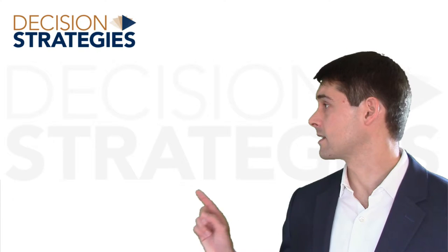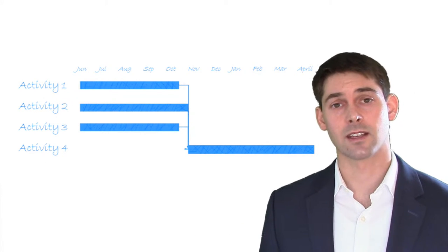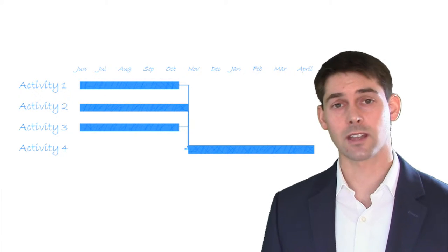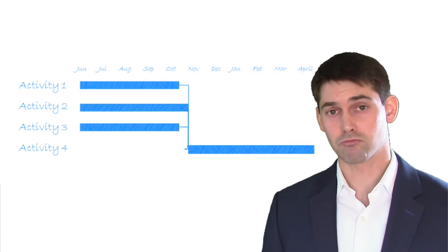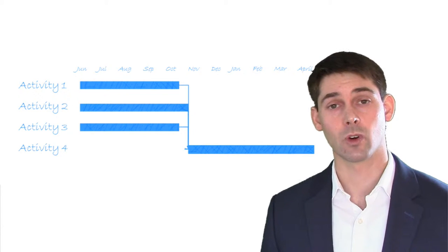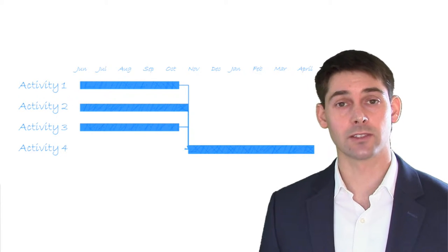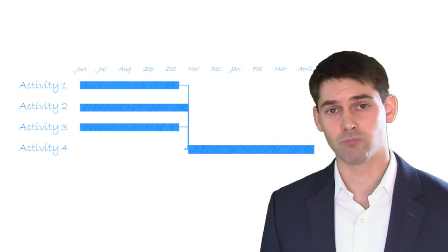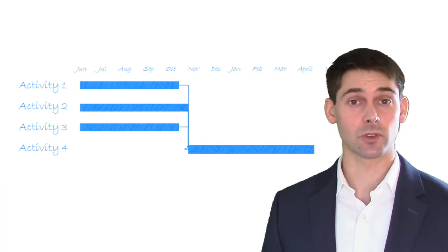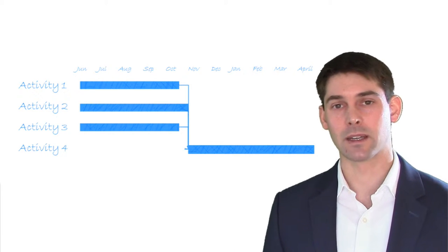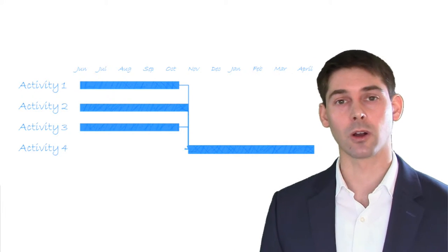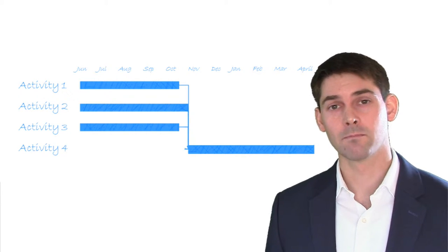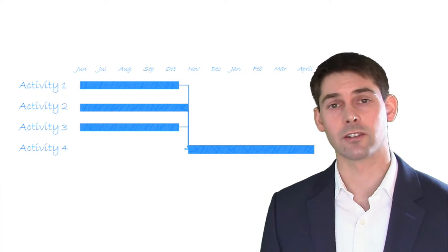Let's take this basic Gantt chart view, where each task is estimated at a set duration and set cost. The expert who put the schedule together has the experience to know that things could potentially take longer and cost more. But in the traditional view, a fixed estimate is required, so we generally give a fairly optimistic assessment. We picture most things going fairly smoothly, and then maybe we'll pad that number a bit to account for some things going wrong. Experience tells us that things can and do go very poorly, but there's no way to convey those risks when putting together a traditional schedule.